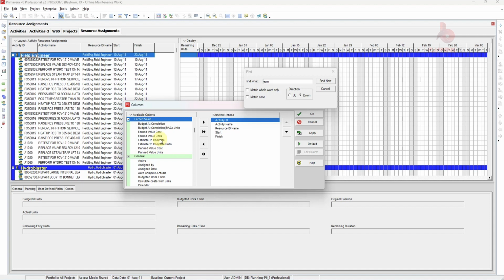Actually, IPMDAR is a project export format required by the USA Department of Defense. The export generates a zip file containing a collection of JSON files which constitute the subject file data and a text file describing the content of the JSON files.